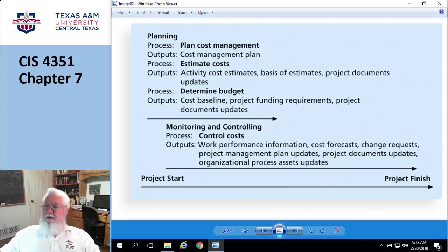So an indirect cost would be, well, should I be paying for 1/4 of the lease and 1/4 of the utility cost, 1/4 of the HR, because everyone goes through HR, 1/4 of the admin cost for the secretaries and the admin pool and the company officers, right? Because is that how it's supposed to work?